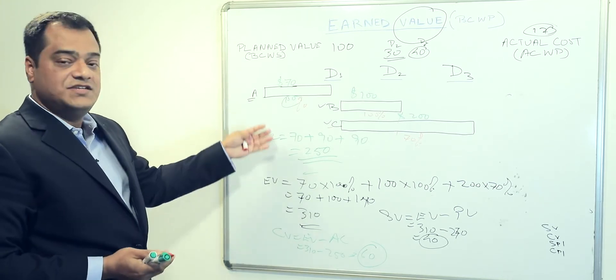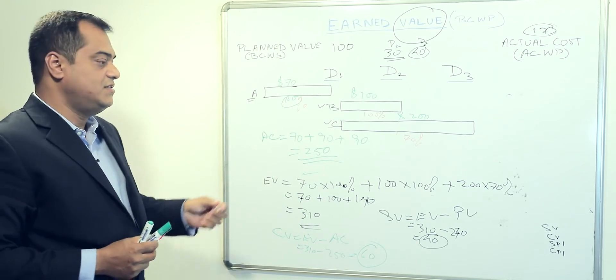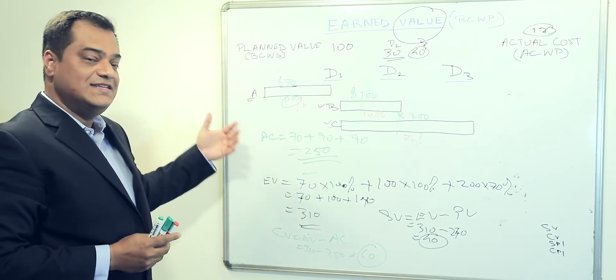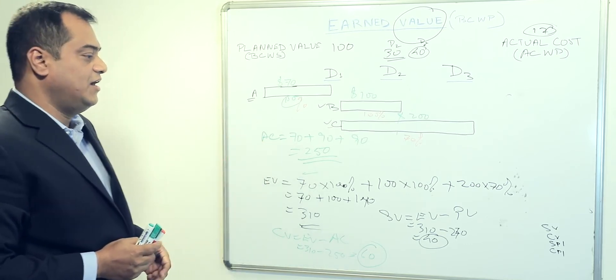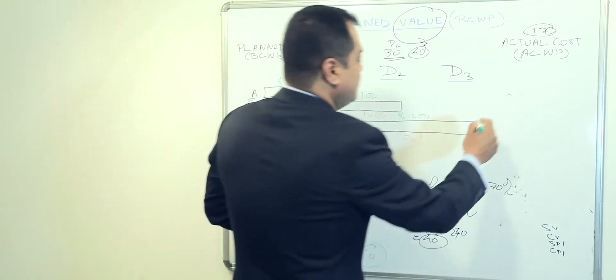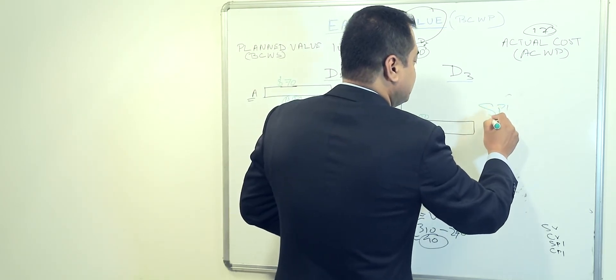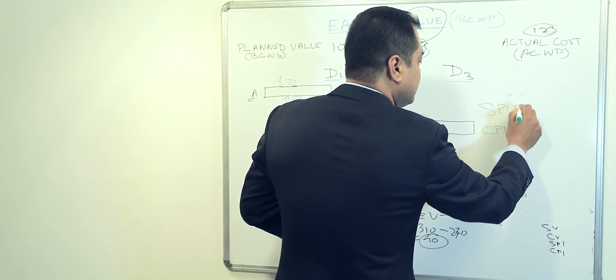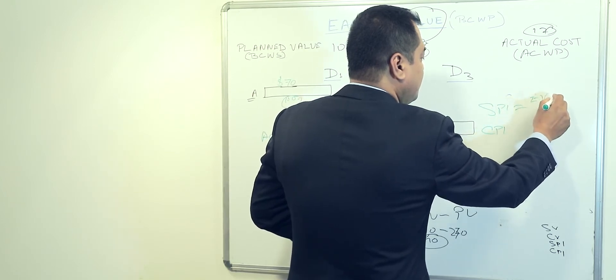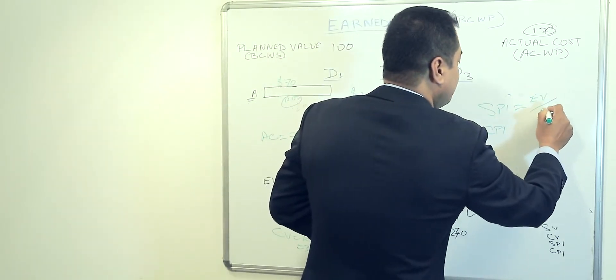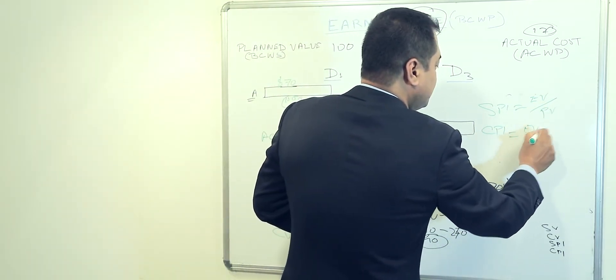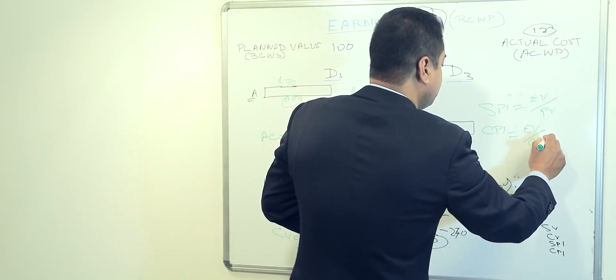This is just measuring the cost. Now if you want to measure in terms of percentage, which means what is the performance indicator between these values, we have got two parameters: schedule performance indicator and cost performance indicator. Schedule performance indicator is your earned value divided by the plan value. Same way, cost performance indicator is earned value divided by actual cost.